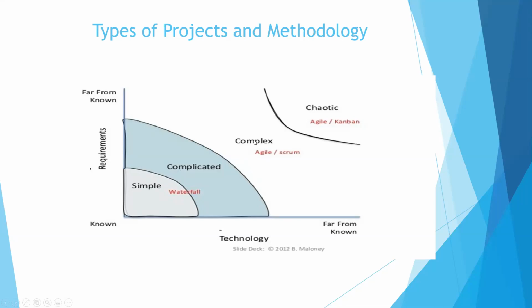You are building something massive. It's just like the universal benefit application that the government are building. There are a lot of gigantic applications that will cover a lot of stakeholders, people working, people not working, people married or not married. Those are complex kinds of application. In that area you can adopt agile to deliver part of it, and there may be part of a big program where Waterfall will deliver some parts, some features straight away, while agile will deliver some features, and they will couple together later as part of the major project.